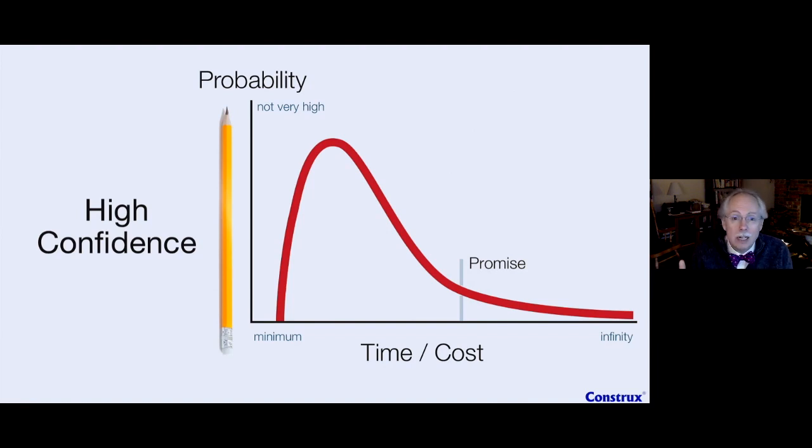And this is where, again, a lot of my clients get in trouble, because they want to make a promise estimate, but their idea of what is scary, what is high confidence, is somewhat limited. Because they've often exceeded their schedule by 100%, and so they think, oh, when we're first planning, let's just do 2x. Well, if you're already normally overrunning 2x, it only puts you down in here somewhere. You'll go up to 65, 70% maybe. You're not getting to 80, 90%. Or another example, a client that always overran his budget, and then he was saying, well, if we put another 50% on our budget, we should be fine. I said, why?